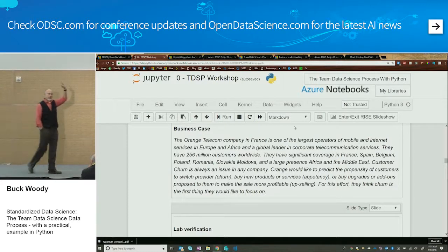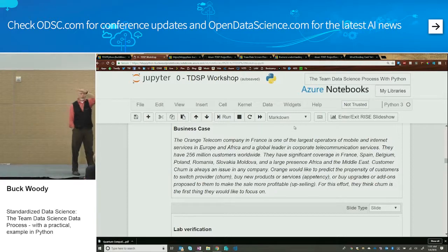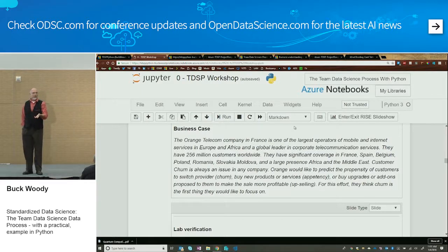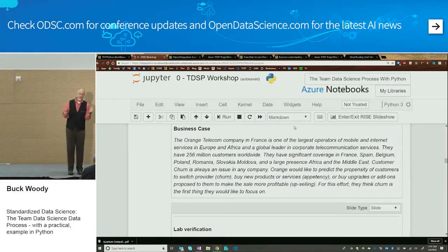There are 3 questions. In business intelligence, you can answer lots of questions with 1 cube. In data science, 1 question, 1 model. First thing you need to let your company know is when we're doing a data science project, every question you ask me is another project because it's different data and it's a different algorithm. Everybody with me on that? You agree with that? Okay.